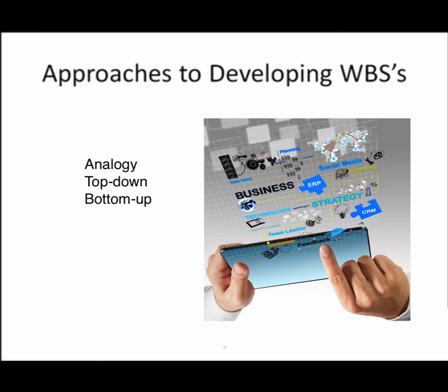Bottom-up approach, it just works in reverse. Here's where you start with a specific task and roll them back up into successive larger pieces of work categories. And there's another approach called mind mapping you might have heard of. Mind mapping is a technique that uses branches radiating out from a core idea to structure thoughts and ideas.